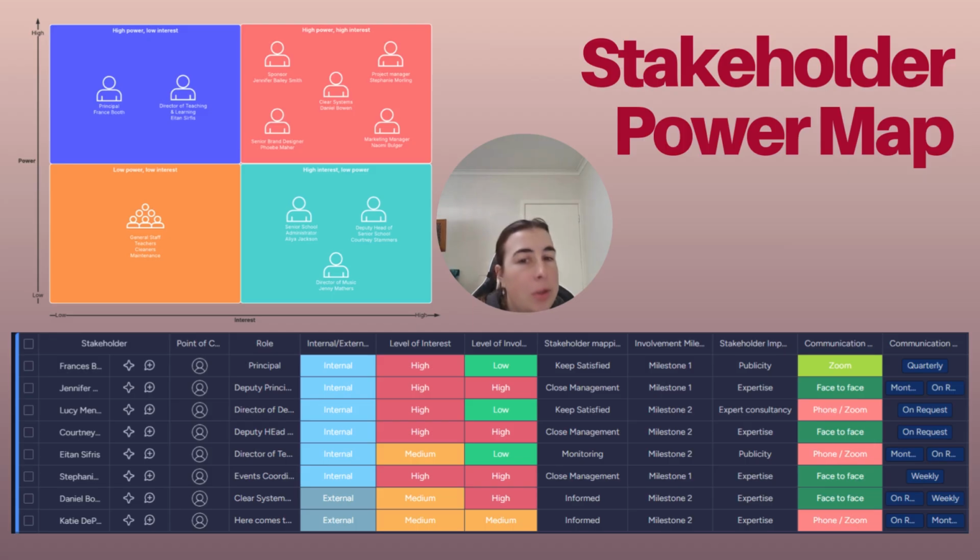For our high power, lower interest stakeholders like Francis and Eitan, I'll keep them informed at a high level, but they won't be involved in the day-to-day details, but they do need to be confident that we're managing and staying on track. Same with our high interest, low power colleagues like our senior school administrators, Courtney and Jenny. You will be looped in regularly with clear updates and opportunities for feedback, especially with rehearsals and as the logistics and the schedules evolve.